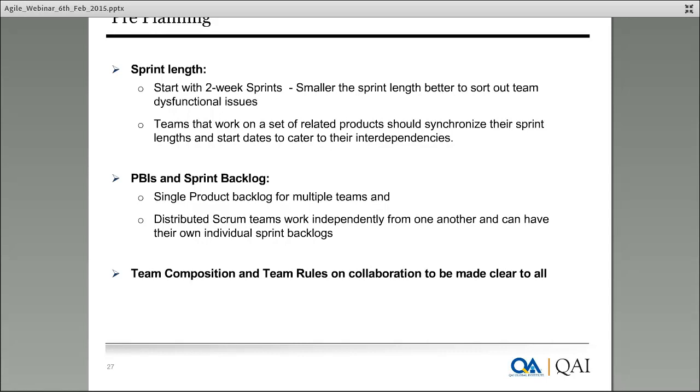All those things can be discussed during the first half, and the team can go back and do an analysis and breakdown of it into tasks. On the next day, when they've got a lot of questions, the same team along with the product owner and scrum master need to meet and provide further elaboration and clarifications. That is a typical practice that we have seen in multiple teams, where the team is not able to conduct sprint planning in one session. The other thing that we have also seen is the daily stand-ups.